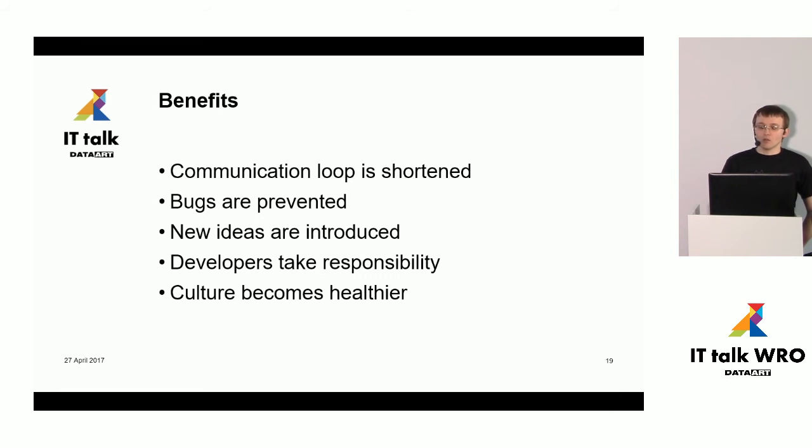It's really amazing how new understanding, how new great ideas can come at this moment, because even though user stories should normally be written implementation agnostic, so they should describe what needs to be covered but not how, we all know how that happens. Story says, as a business user, I need a new table to be displayed, blah, blah, blah, to be able for me to read some information. At that moment, developer can come and say, why do we use table here? We can use some chart instead, some, I don't know, drop-down lists, etc. And that is a really good thing for the whole project, because some ideas will never come to business analyst or even stakeholders' mind. Only developers can help with that.